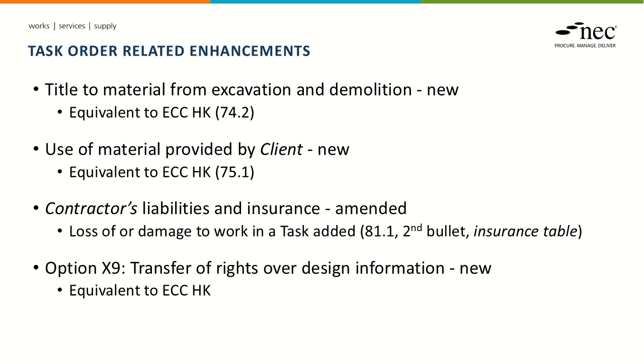Other provisions related to task orders. We've made a small change within Section 8 of the contract. This is to do with insurances to cover loss of or damage to work within the task. X9 has been brought over from the ECC Hong Kong edition, and this is to do with transfer of rights over design material. So if, as part of a task, a contractor is being instructed to do some design of what they're going to build, this deals with the rights over that design.